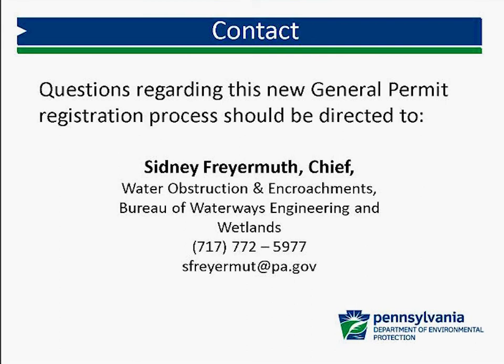Will an approval letter from the County Conservation District for the E&S plans be required for GPs other than GP 11? The County Conservation District is required to deem your E&S plan adequate for general permit authorization. It may be in the form of a letter. It may be a verbal approval. I cannot tell you how they do all their authorizations. The E&S plan for GP 11 will continue to be approved by the department.